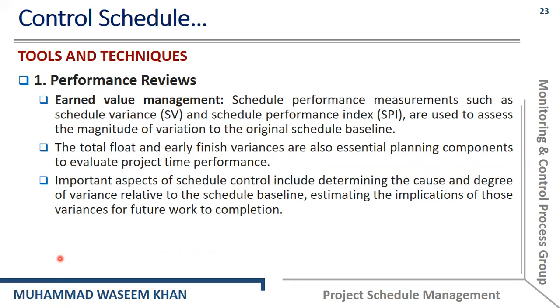We use different performance measurements such as the schedule variance and the schedule performance index, and we use these types of measurements to assess the variation between the original schedule and the actual schedule.